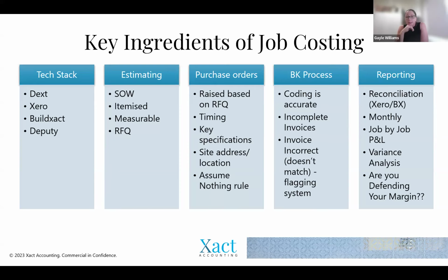So for your big suppliers, while you're building your estimate, you should be getting quotes from those suppliers that have their terms, their timeframes, and their estimates in there that you can then hold them accountable to as well when they're delivering those services on that job. It just reduces all of the backwards and forwards and the arguments that may come about if halfway through a job you get an invoice with an overrun and it hasn't been accurately agreed beforehand.